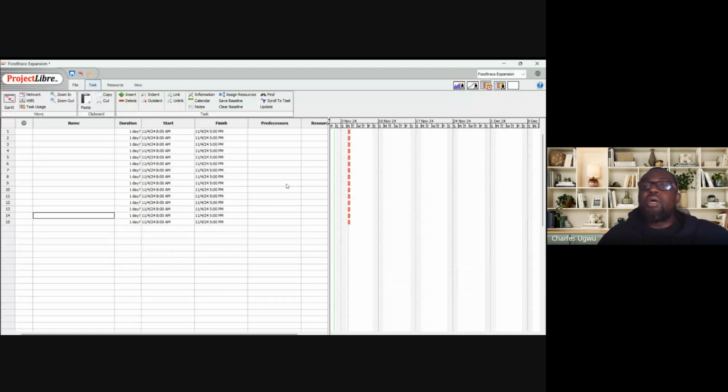Okay, the reason why I claim the work breakdown structure I've entered already is because I want to capture the stages within every task. So that is the reason. So I've captured the initiate stage, some activities within the initiate stage, some activities within the planning stage, activities within every stage.